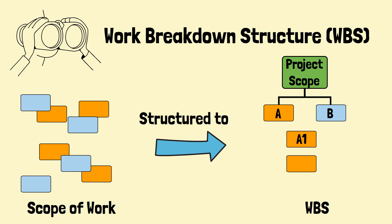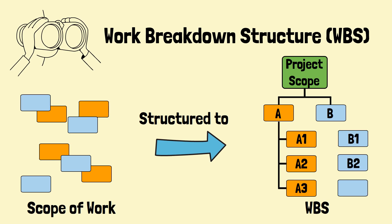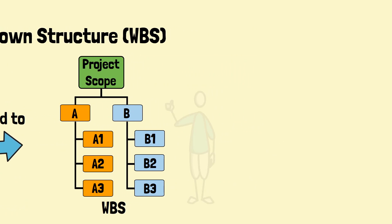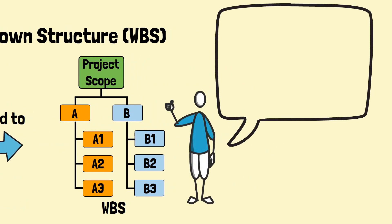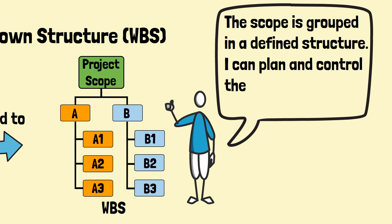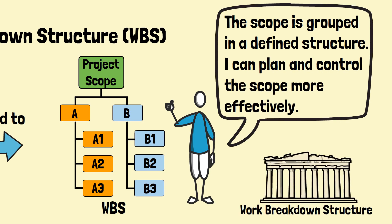Each descending level represents a more detailed definition of the project work. The goal of the WBS is to present project work in a hierarchical, manageable, and definable format, serving as the foundation for project planning and accountability.